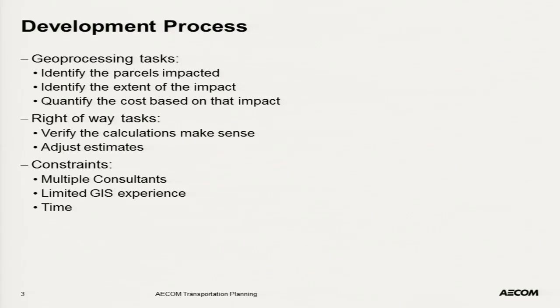That part was straightforward, but we knew there was going to be stuff that we were missing, so we contacted the AECOM program manager for right-of-way, Claire Trinnell, and asked her about some of the things. She pointed out stuff we never would have thought of, like that you might need to compensate a business because you're taking 3 of their parking spaces, and all of a sudden, they don't meet the city's codes for having enough parking for their facility. Or you're taking part of their driveway, and so now you've got to figure out a new traffic flow for people to get into that fast food restaurant's drive-through. Or somebody just spent $40,000 re-landscaping the front yard, and they want some of that money back.